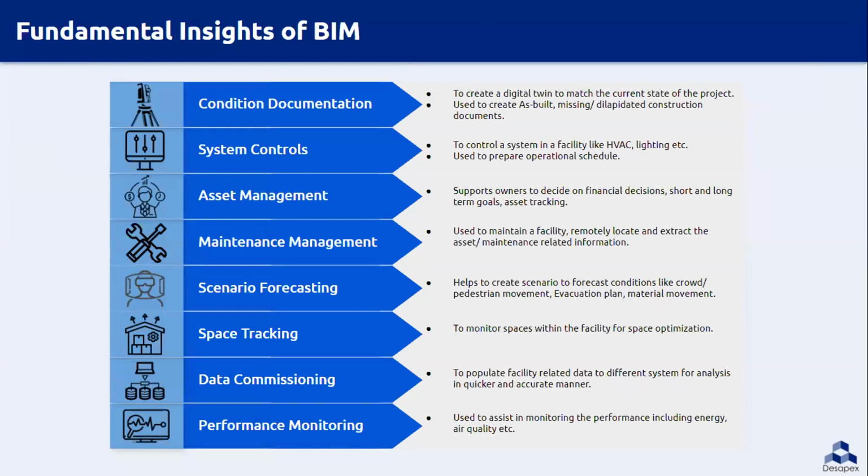Commissioning. The BIM model can be used to populate the organization's facility management system, in which facility data such as part number, warranty information, etc. can be transferred with accuracy and can significantly reduce the data entry time. BIM can also assist in monitoring and performance, including items such as energy, air quality, and security.